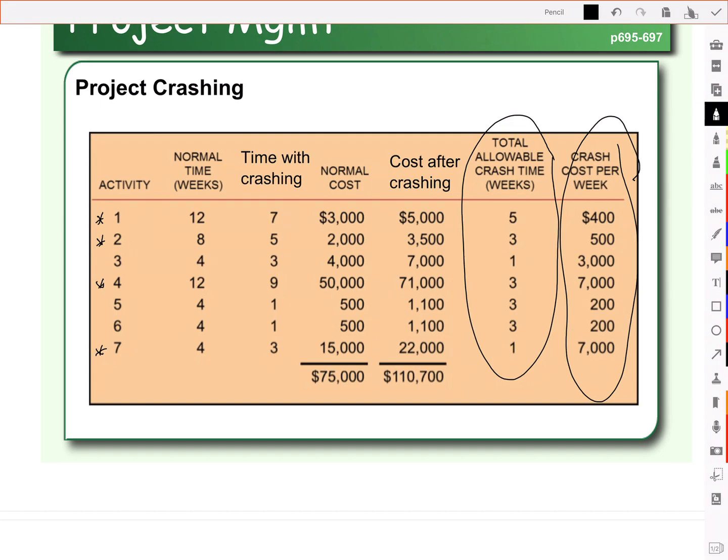Now, that critical path, 1, 2, 4, 7, took 9 months. And if we assume that there are 4 weeks in a month, then we're looking at 36 weeks. We can see here, for each of those activities, how many weeks can be shaved off, and at what cost.